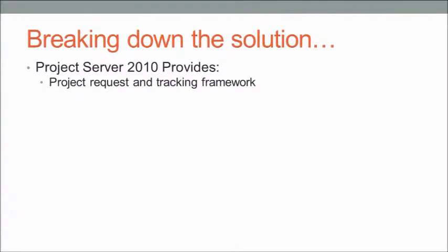It offers you a framework, pre-built. It allows you to use the portfolio tool that you saw I used, and I only took you very, very briefly through it. I could spend an hour just on the portfolio tool itself, because it's not just that bit of selecting, but it's how you decide what the weightings are going to be. Very straightforward to do, and you can actually build up programs. You can link projects to each other before you even start that process. So you can say that if I'm doing project A, I'm not going to do project B, but I must do project C. So you can actually build relationships up between projects as well, because often you want to break things down.